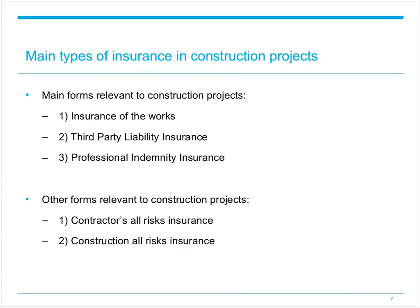While all insurance policies compensate for losses from insured risks, there are various forms. In construction, the main types required on projects are: firstly, insurance of the project works; secondly, third-party liability insurance; and thirdly, professional indemnity insurance. Many contractors also carry Contractors All Risk Insurance covering a package of known and specified risks, or certain projects may require Construction All Risk Insurance, which bundles together insurance of the works, third-party liability, and professional indemnity insurance.